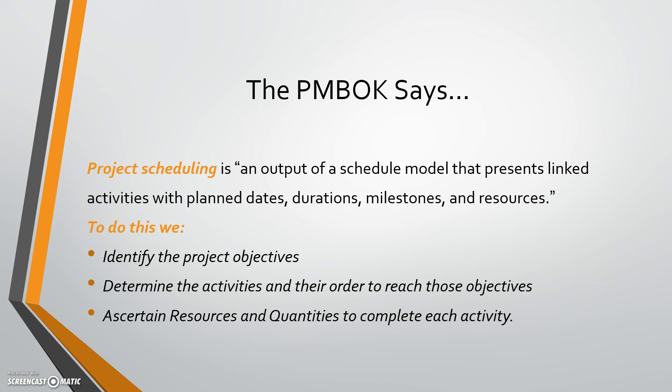Think of it as a tower. You have your objectives at the top, breaking that into smaller pieces being the activities in a certain order, and then with each activity you break it down into resources. On a work breakdown structure schedule, or WBS, you're breaking that even into smaller things called tasks, and even subtasks if necessary.